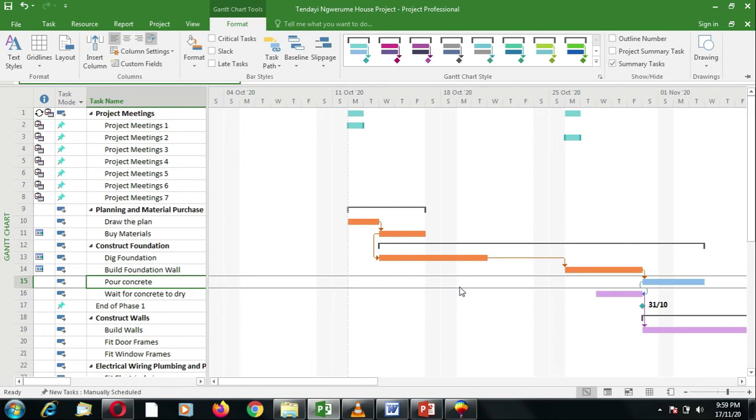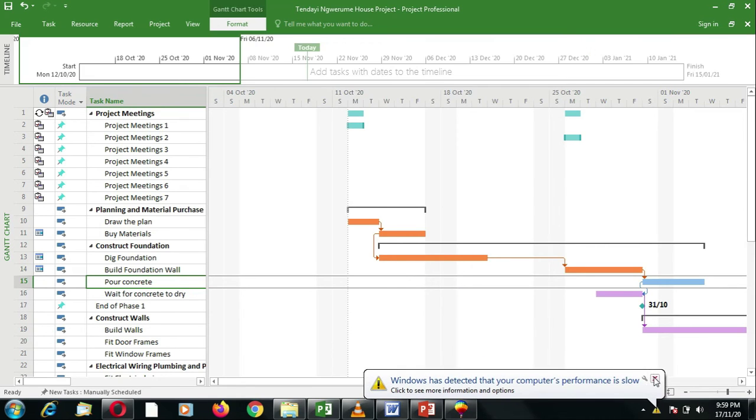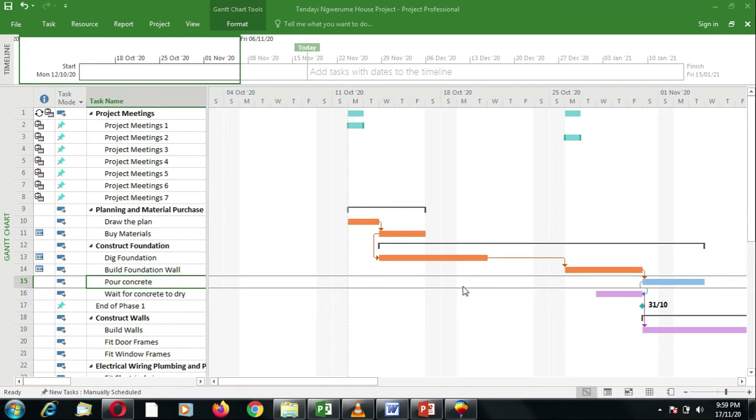Because we said that these tasks are happening straight after each other, according to their start and finish dates, we don't have any flexibility, meaning that every task before this particular one is actually a driving predecessor, because any changes in any of the tasks is going to affect or to drive the scheduling of this task that is selected there.